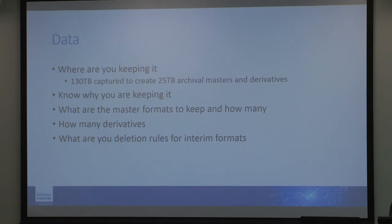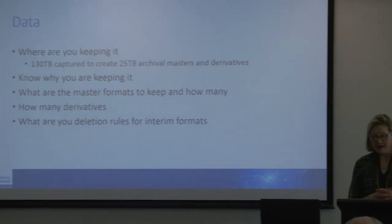Ownership. Ownership is really important in terms of how we deliver the information and the content to the client. It's really important to have those deliverables signed off. And a debrief: regardless of the outcome, it's important to make sure you take the time to look back. What worked well, what didn't, document that. What would you do different next time? And these are all lessons learnt that can be passed on to future projects.